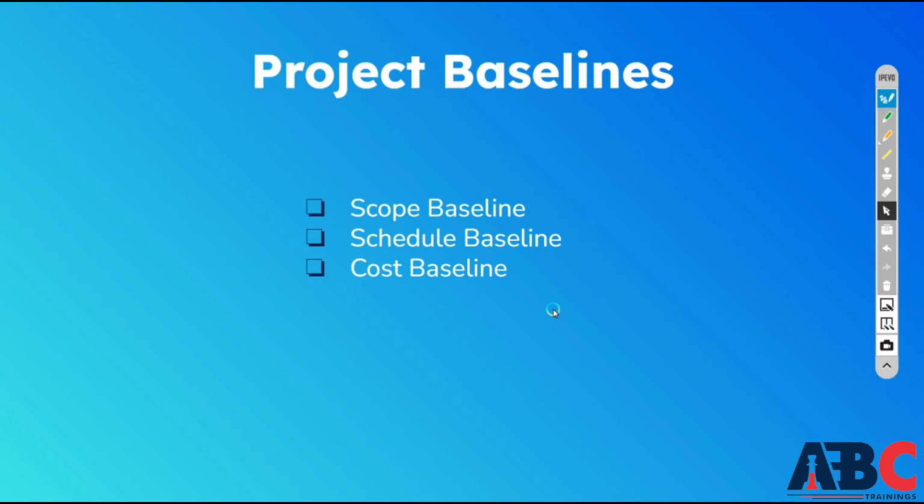Let us understand that you have started a project, and its planning is complete. If you are preparing for that, what is the primary? Its estimated time, its estimated cost or its estimated schedule, or what are the scopes from it? All the things that we find out, we call it the baseline. If there is any change in this baseline or there are some updates in it, then the changes happening in your project will make your baseline completely different. The estimated time or cost we call the baseline, and the actual will be different.